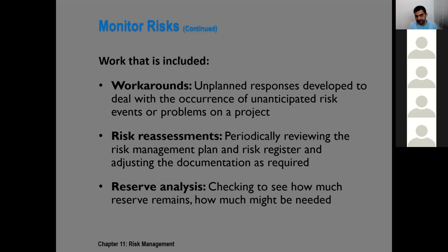Also, during monitoring, if a risk comes and there is no contingency plan, no fallback plan, the risk is unforeseeable, then sometimes we have to find a workaround. These workarounds are unplanned responses.